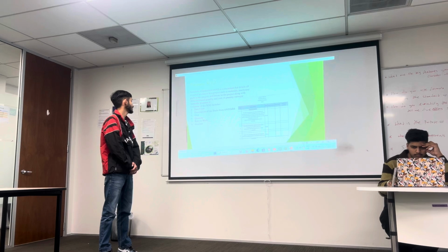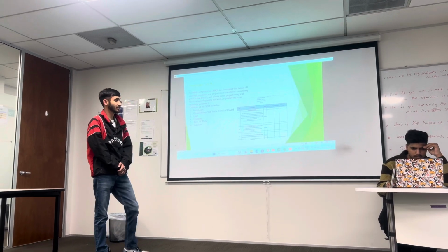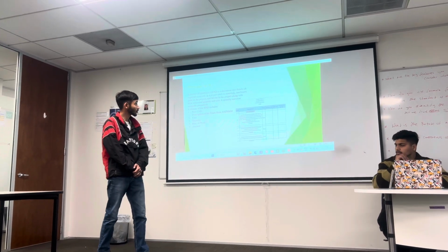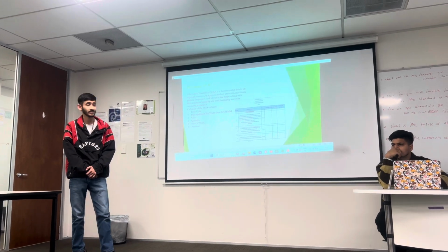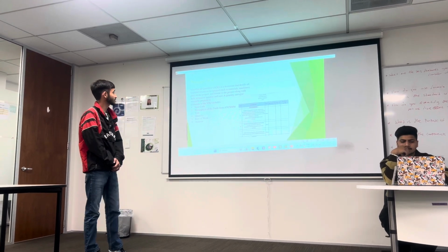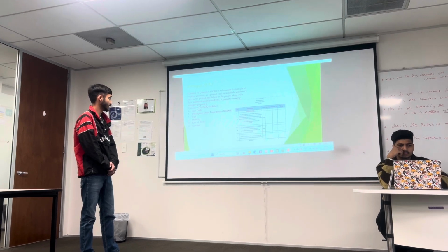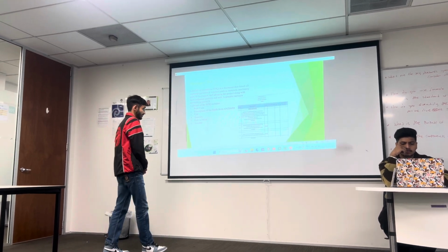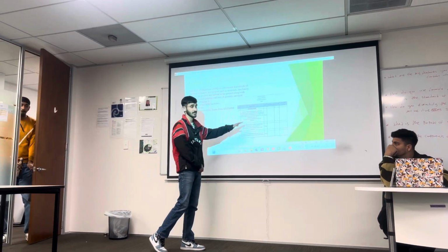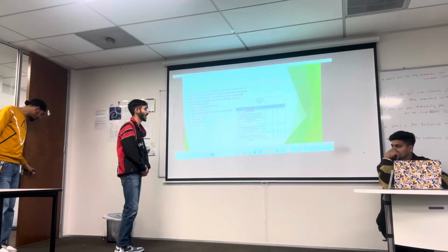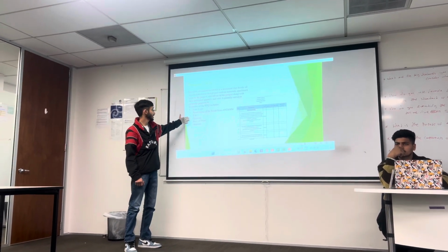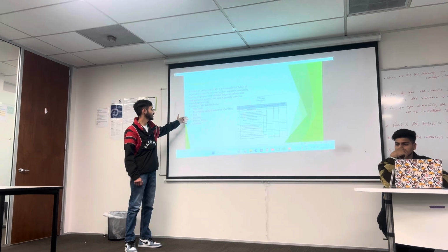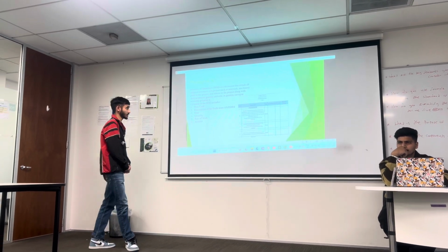And lastly, the prepared SOQ. The schedule of quantities is a document that details all the required resources in a project, as we mentioned earlier, such as materials, machinery, parts, or the manpower. There are 6 columns in a SOQ, which are item code, description of the trade from ANZ SMM, unit, quantity, rate of work, and amount.